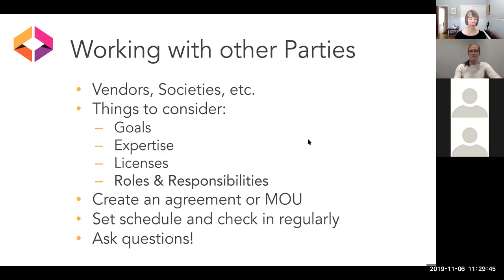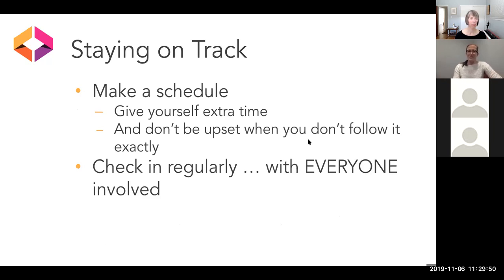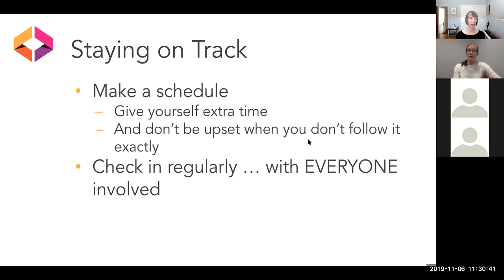When making a schedule, always give yourself extra time and don't be upset when you don't follow it — it's completely normal with so many moving pieces. Make sure you're giving a little buffer room in case someone is sick, or the holidays arrive, or an author suddenly has a million papers to grade. If that buffer still isn't enough and something falls apart, that's okay. Check in regularly with everyone involved — if something is falling apart, you need to know about it. If the author isn't able to finish because they're too busy grading papers, it's better to know early so you can adjust the schedule.